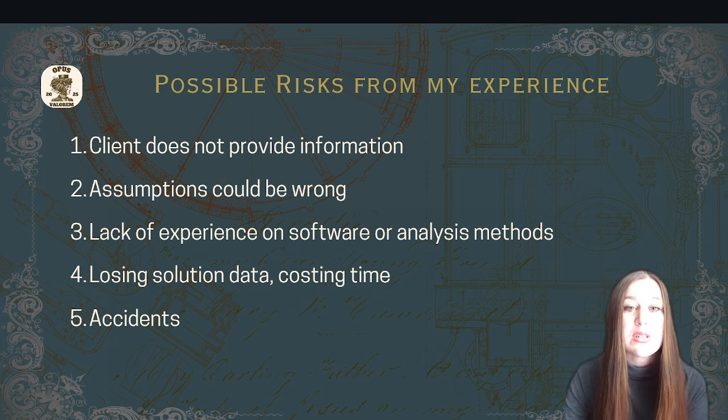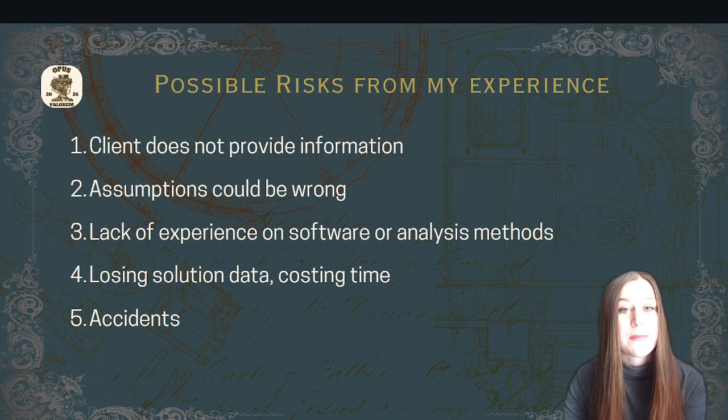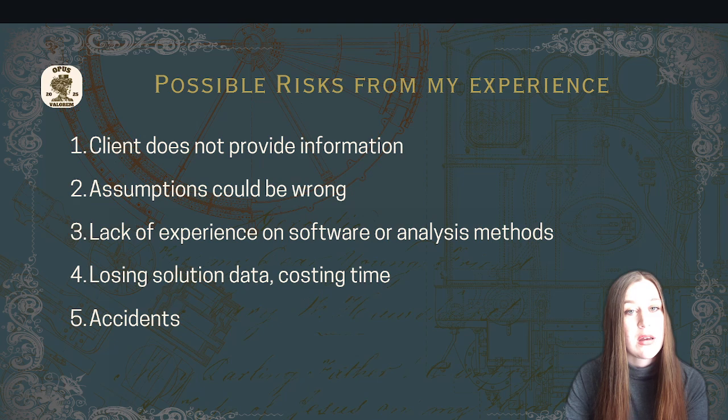At the project proposal stage, you need to come up with at least one risk to mention at every stage of the project. At project execution stage, you will need to come up with either actions to take if the risk does occur or actions to take to prevent the occurrence of the risk. One main risk that you may include in your thought experiments may be to note your lack of experience in executing certain tasks, though you think that you should be able to execute these tasks already.